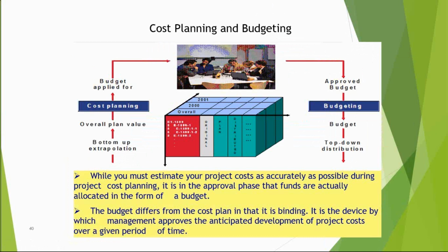So how do we do the distribution of the total budget to the WBS? Is that decided manually or applied systematically by the system? You can do it manually, or in the system itself. In CJ30, you will have the cost planning first. You will be copying the cost planning in column A. Once you have the budget placed, you can copy-paste the same cost planning as your budget, or you can distribute it manually from WBS to WBS.